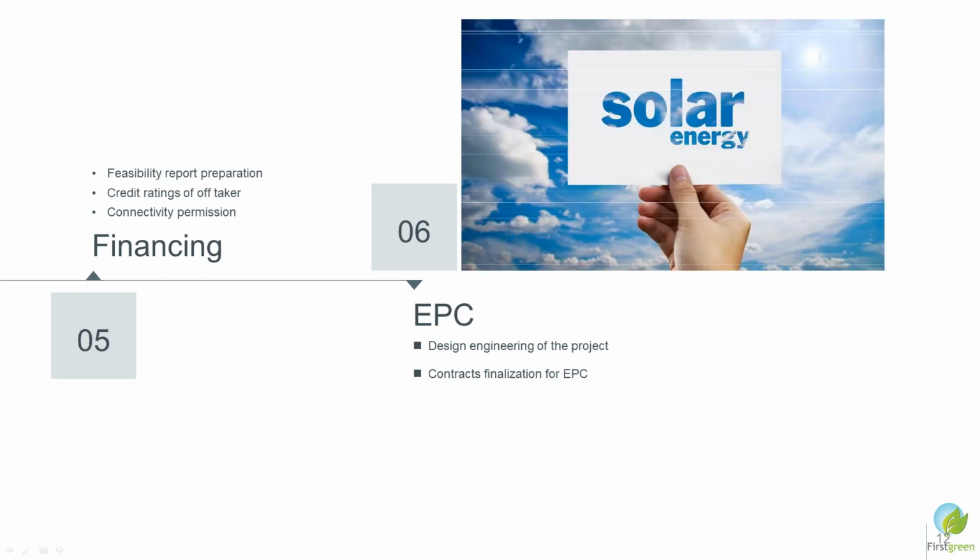Though financing is an important aspect in the project development process, this doesn't come after design engineering, but it can run parallelly. So financing means once your PPA is signed, you are ready to go for installation, and you need to procure your items. Your design is also finalized. All approvals and clearances are in place. You are good to go for installation. Then you need money.